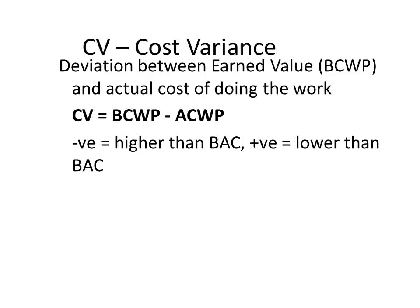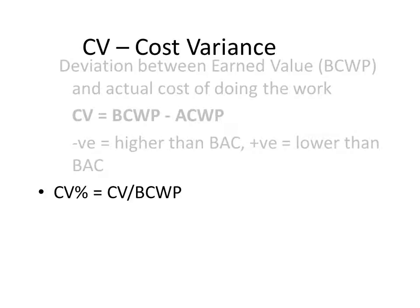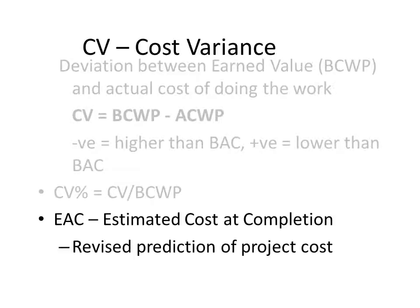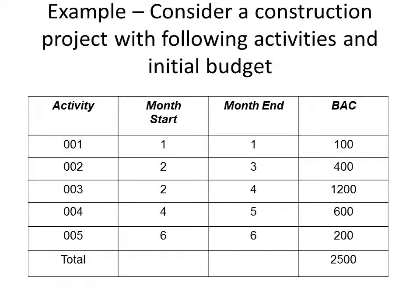Cost variance indicates the deviation between earned value (BCWP) and actual cost of doing the work. If it's negative, your actual cost for completing the project would be higher than the allocated budget. If positive, the final spending would be lower than the budgeted cost at completion. We use the formula CV divided by BCWP to calculate cost variance percentage. EAC refers to estimated cost at completion — the new predicted cost for your project to complete.